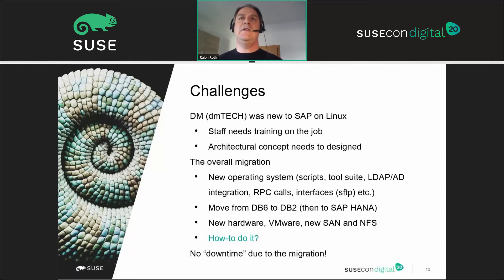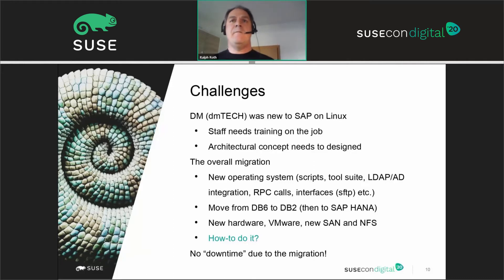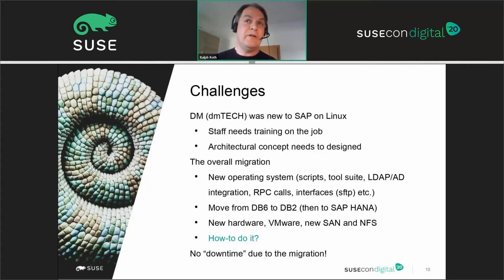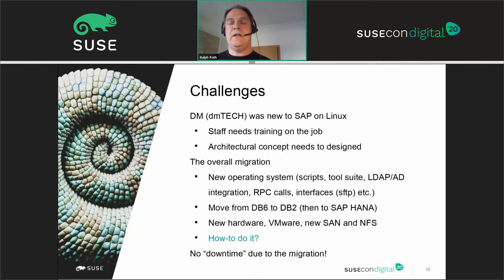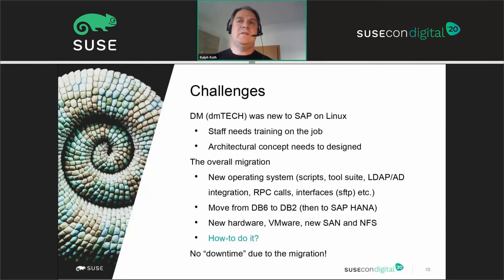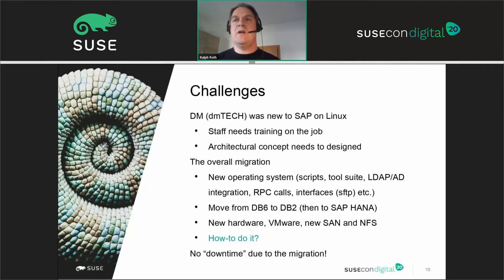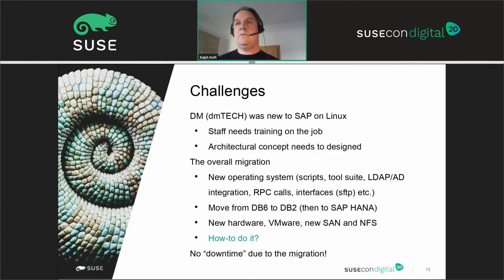The customer saw several challenges for this migration project. They were new to Linux, so staff needed training on Linux — training on the job. An architectural concept needed to be designed. With a new operating system, you need new scripts, new tools, Active Directory integration. SAP RFC calls needed to be checked, SAP interfaces needed to be checked, and even simple things like file transfer needed to be reviewed and kept in mind.